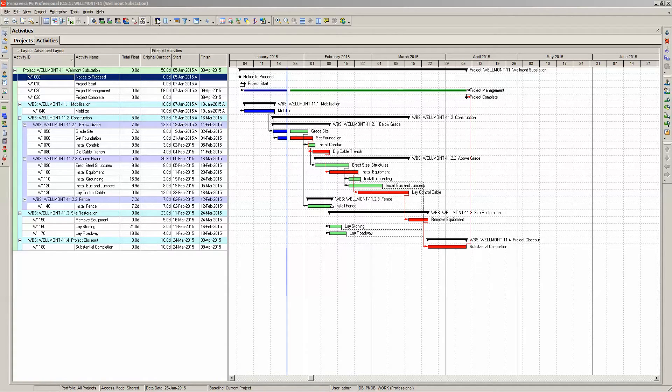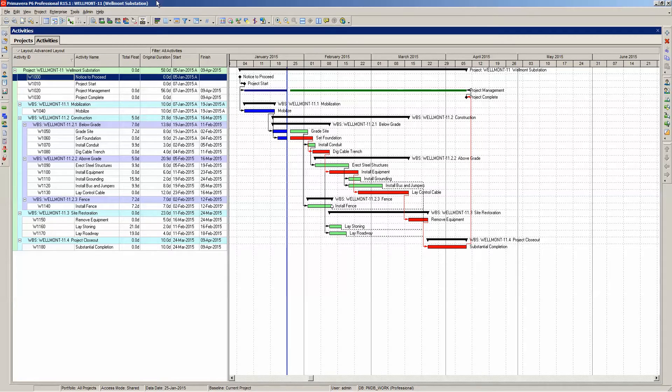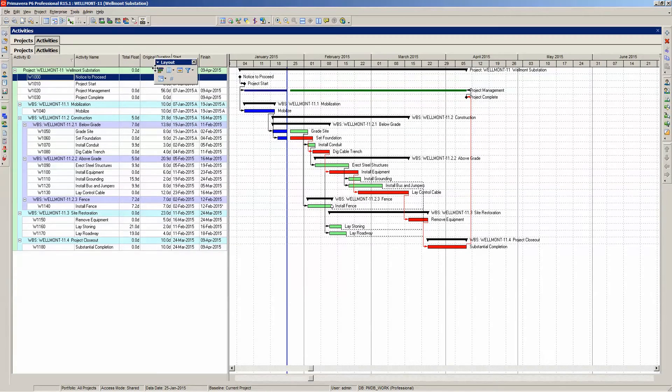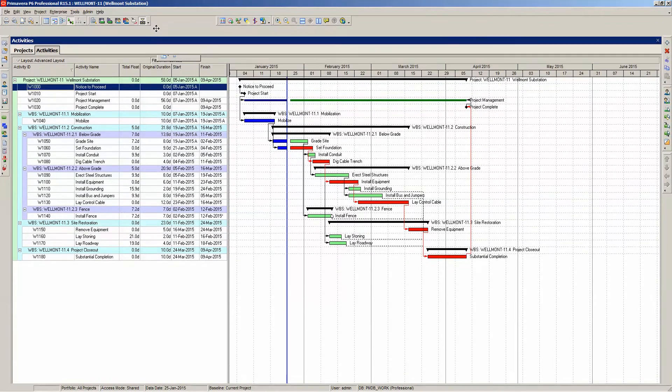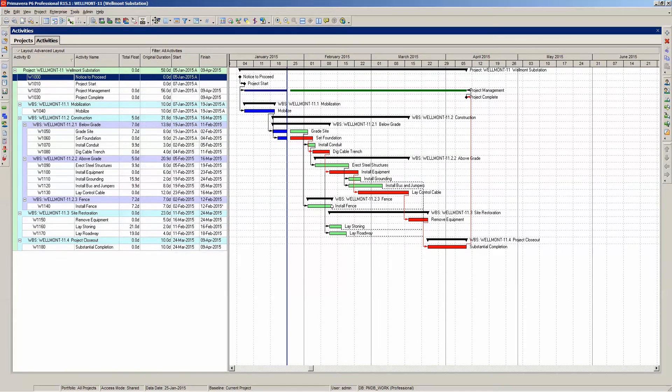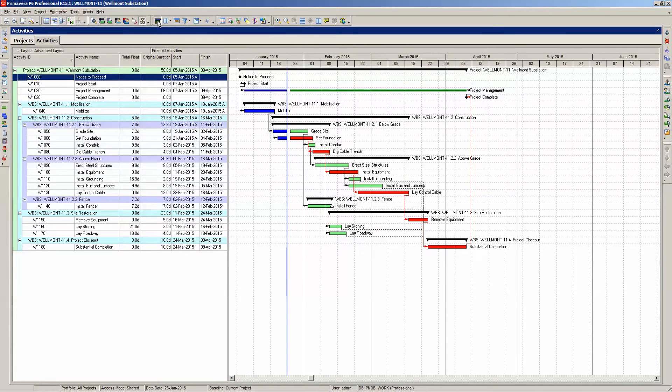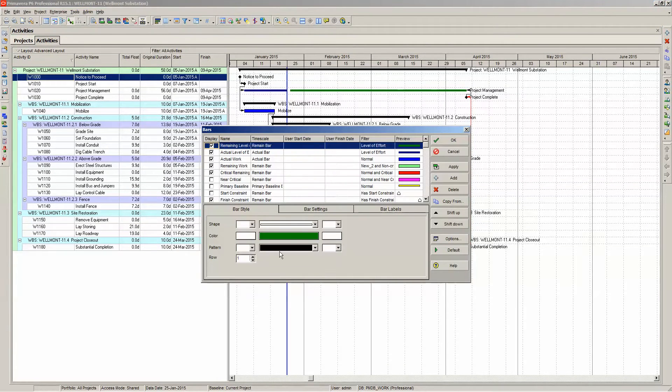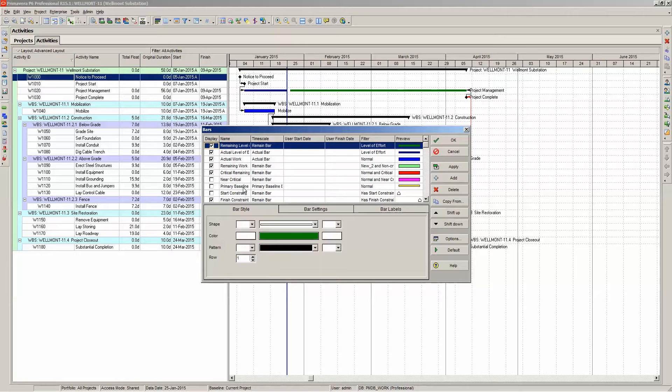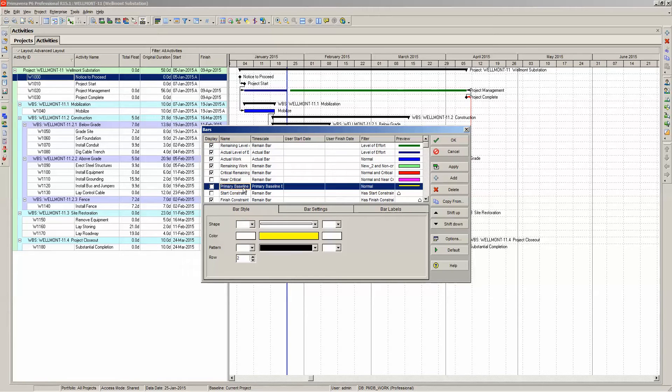So let's begin by entering the Bars dialog at the top. This is in the Layout tool group. So let's select Bars and then go down to where it says Primary Baseline. This is where I'm going to insert my float bar.